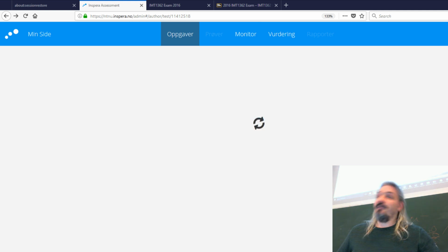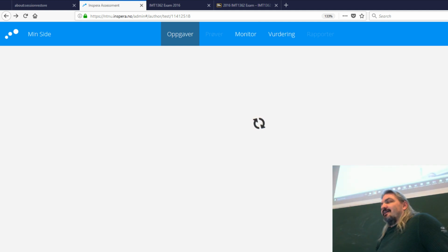So it depends on the group. There is an issue with the number of tasks, particularly the number of small tasks. Depending on the company you're in, one approach is to use something called story points, where you talk about complexity rather than the time something will take. With story points, when you talk about the size of a task, you're talking about the complexity of the task.